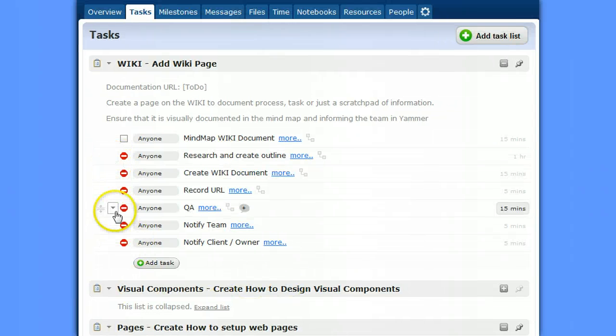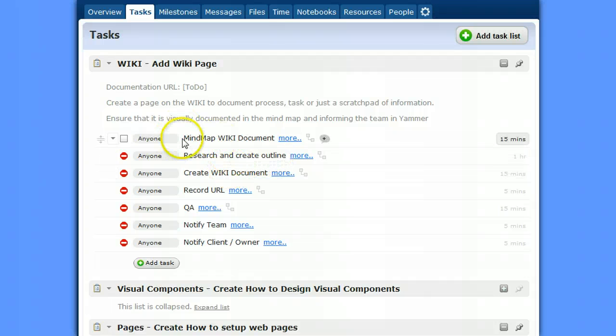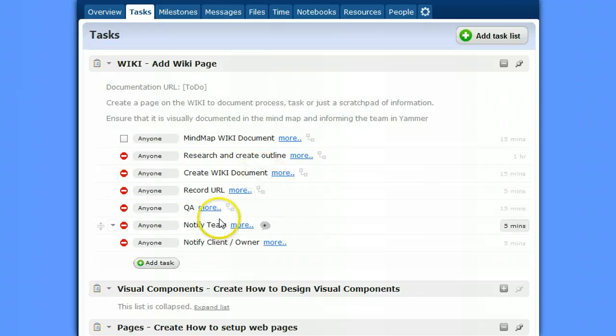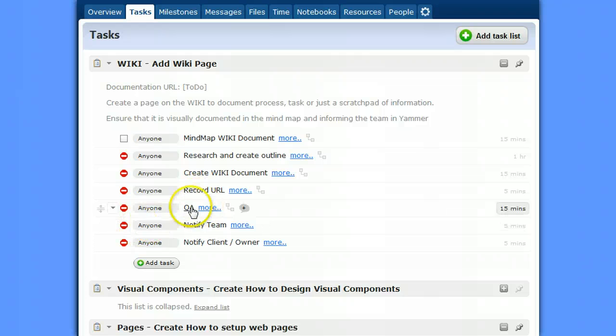Now I've gone through and created all the dependencies I want. I did fill this one in. So this is dependent on here, dependent on here, up, up, and these two are individually dependent on QA. So they can be done at the same time.